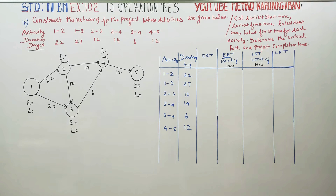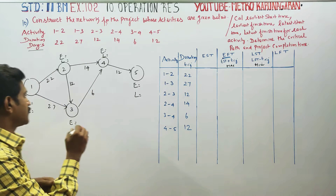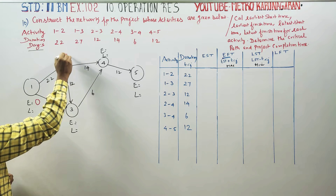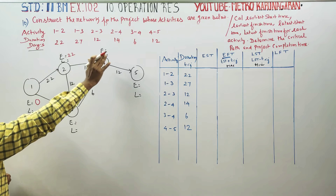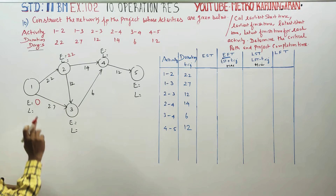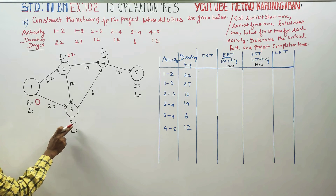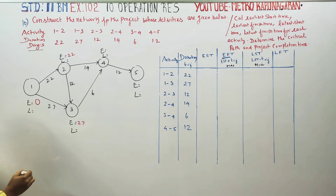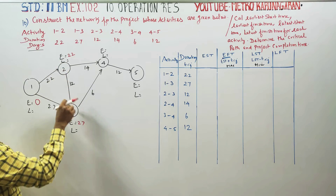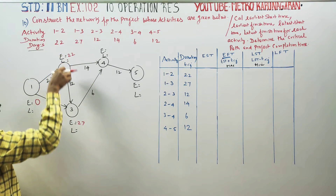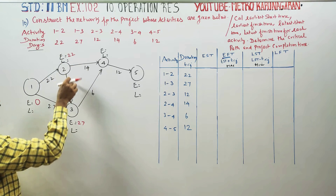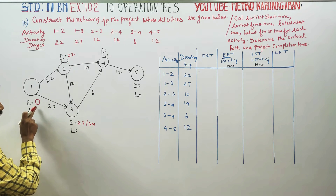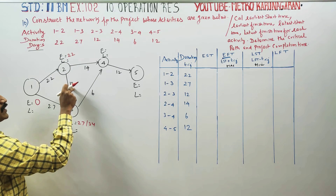The earliest starting time is 0. We will start with 0 days. 0 plus 22 gives the earliest value of 22 for node 2. For node 3, 0 plus 27 is 27. Then the next track is 22 plus 12, which gives 34. Now you can see 22 plus 12 is 34.